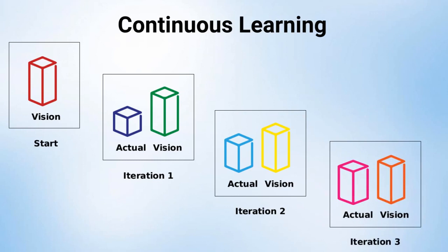You can see that we are building the project incrementally, because we are building it piece by piece. We are building it iteratively, because the product gets improved as we are learning along the way. That is why Scrum is both an incremental and iterative approach to building projects. This process of building and improving parts of the product continues indefinitely, allowing the product to stay relevant in a changing marketplace. At the end of every iteration, a product called an increment is ready.